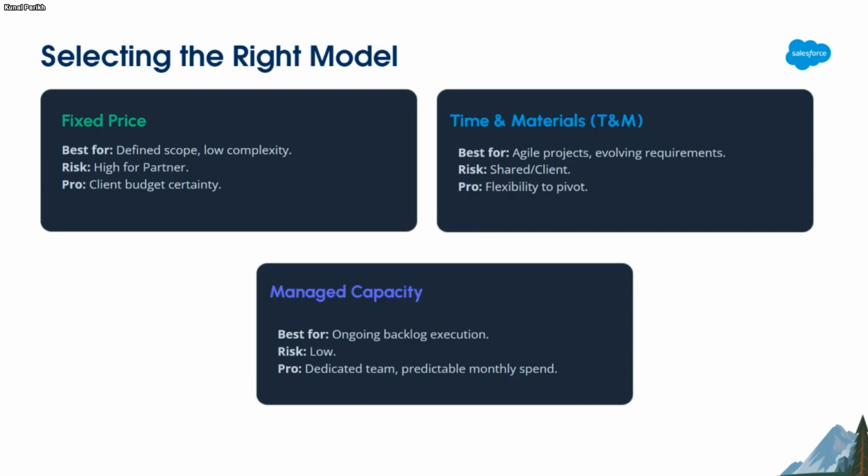So definitely there is a risk from both sides, but at the same time the pros are that it provides flexibility to both. The client can discontinue any particular scope of work or any particular contract at any stage, and the partner or implementer can charge money depending on the actual effort spent, and so on. And third is with respect to managed capacity.